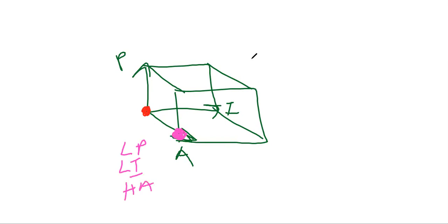And you could look at this as power, you could look at this as interest, but you could look at the z-axis as attitude. So you could have a stakeholder at the 0 point, low level of power, low level of interest, and a poor attitude. The closer they are to 0, the poorer the attitude is. The further out they are away from the 0 mark, let's make this over here, this stakeholder has a low level of power, a low level of interest, but a high attitude, or a good attitude, if you wanted to call it that.